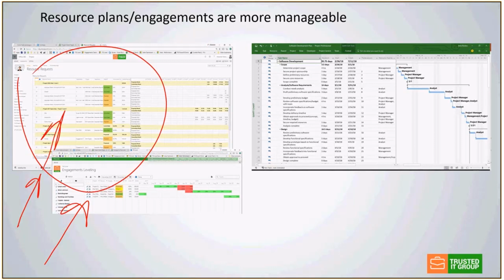And then you just fill out these users, fill out those resources, and fill up their plates, basically, until you can build the organizational demand for those resources. You can also assign some of the work to operational activities, saying that 20% of their day for these people will be dedicated to support, and you can account for that as well. So this is not at the project by project level.